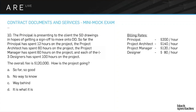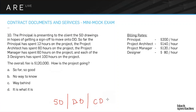What is this question really getting at? It's about money — does the money match the schedule? We have a very particular point in time: the sign-off of SD, the changeover from SD to DD. So we have a scheduled moment and a dollar figure to evaluate. SD is schematic design, DD is design development, and CD refers to contract documents.